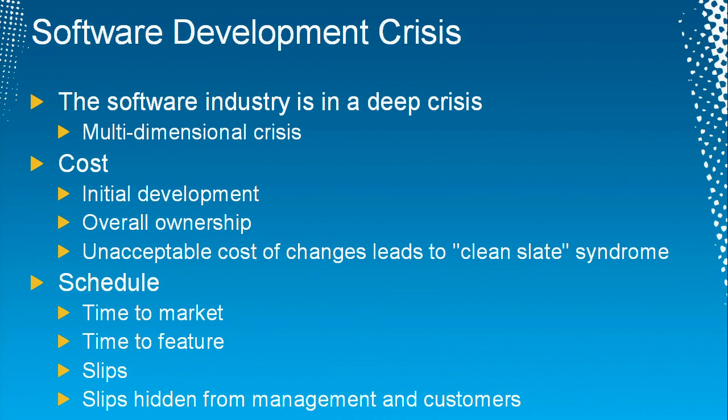Quite often when you or your managers budget and estimate something and the customer signs off on the cost, yes, the cost for 1.0 is this, but the thing is going to be in maintenance for another 7 years. It's going to cost you like this. If you're going to say on day one to the customers it costs you like this, they're going to say, no, thank you. We're better off with the fax or the phone or the mainframe, anything besides spending that. And even if the initial cost of development and the cost of ownership is somehow contained, typically it's not.